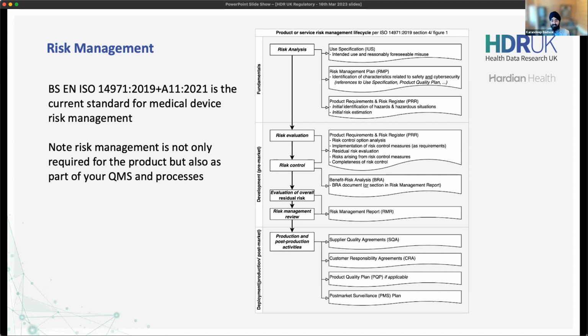Amazon, AWS, and Git, if you read their terms and conditions, they say they can revoke your access at any given time without telling you why. Hence why we always bang on about having a backup. So that's also a risk. Imagine you lose your code because you can't access these systems. So then what you do to mitigate that risk is either you download that code and you keep it on an internal server, or you keep it on a different platform provider effectively.